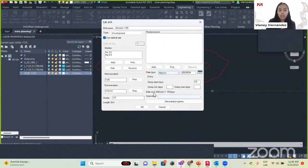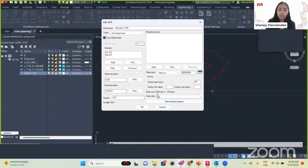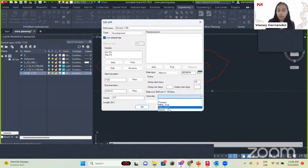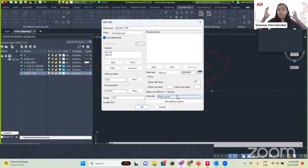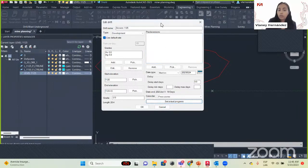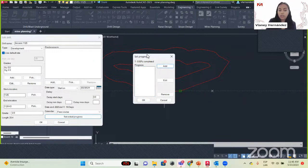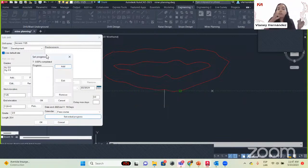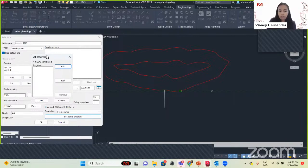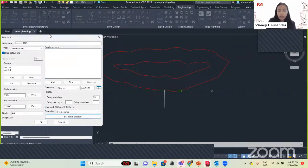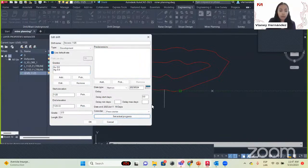We click OK. We can see the start date we selected and the end date. It is going to take us 19 days considering this rate per day, and we will be done by June 11th. We select the calendar we created, which will consider the days we are not going to be working. We can also set an actual progress — if you already started this part of the mine, you can set a progress so the program calculates from there rather than from zero.